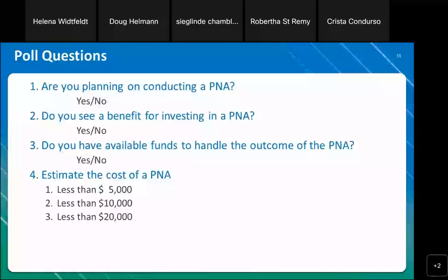Maybe there's a standard of cost that we should not exceed, or it's considered costly, or maybe there is a per unit cost. It's going to vary by the size of your property. Most condition assessment work is estimated on the square foot level as you get to higher volumes. But if you have a very small property, and especially if you're contracting out with a consultant, there's going to be a fixed cost for just them to be able to cover the expenses to travel to the site, do the surveying, create the reports, and have the appropriate meetings. So it really depends on the size.